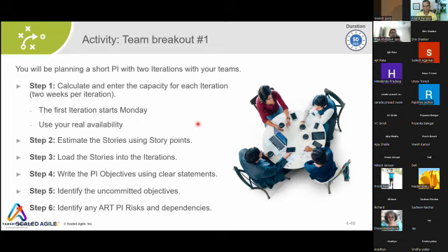Okay. Because we don't know how the unknowns will become knowns in the upcoming times, and also if any incidents or ServiceNow tickets come up, along with spillover items, then the prioritized items might change. Yes. So plan for 2 to 3 iterations, and the last 2 may be fuzzy.